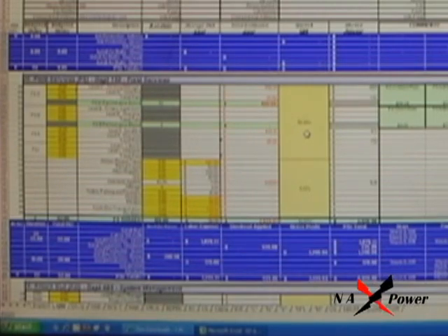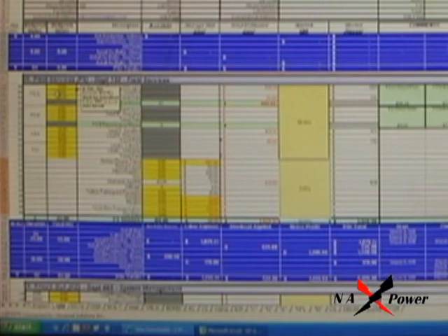One of the easiest certainly is to increase your margin. Just going 55 points is the nicest, because that way you keep all of your budget straight as far as hours and number of hours to be expected. The idea here is to make sure you give out budgets that the field service as well as project managers and engineers will all buy into. You don't want to have anyone sitting around saying, hey, I got this crazy budget, I can't even live up to it, all because you're trying to make some sort of number. So it's always easier, if you have to get to a number, to decrease your margin, leave your budgeted hours alone. Otherwise, people won't buy into the budget and nobody makes any money anyway.